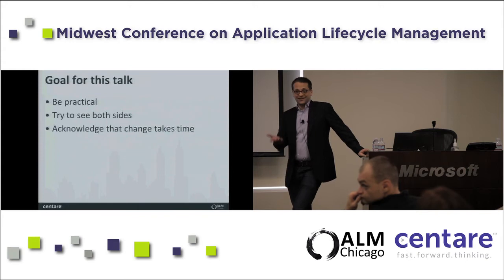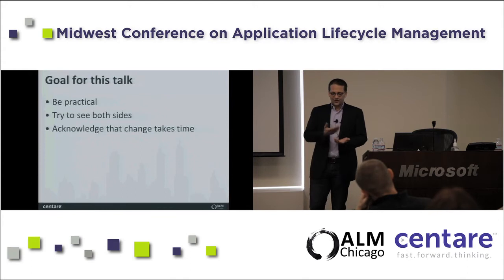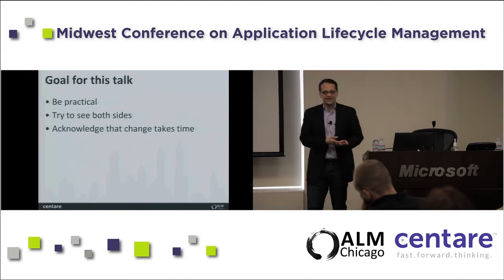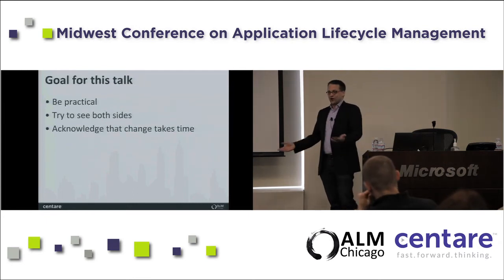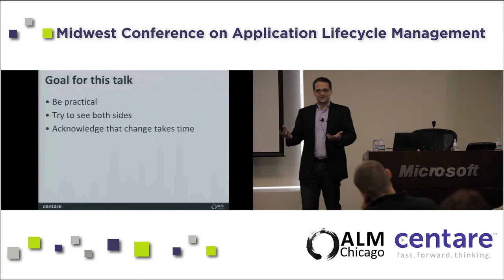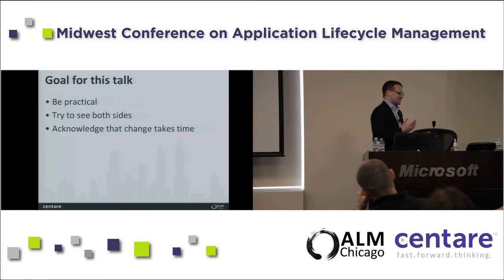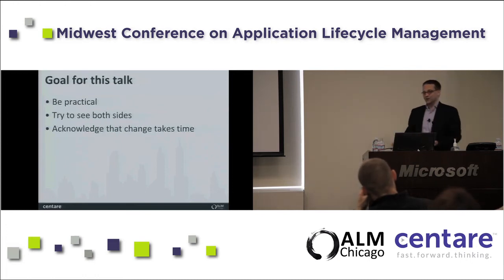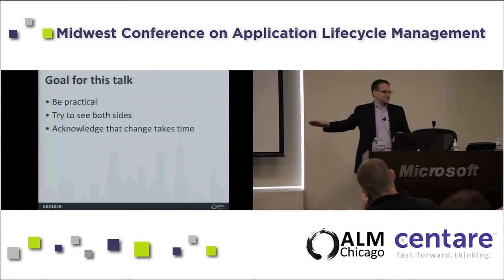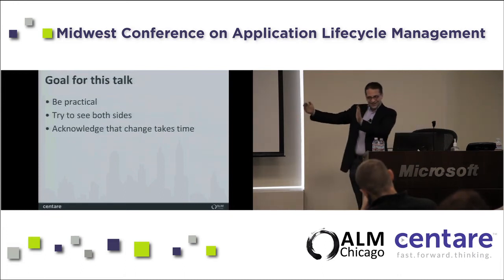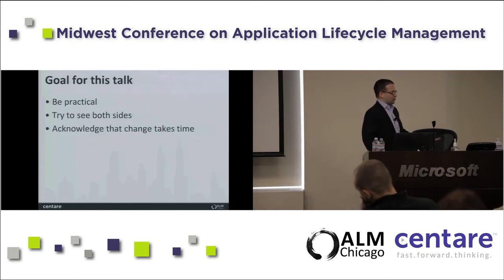Yeah. Well, that's a really great one, because Scrum and Agile tend to emphasize test-driven development and unit testing. It's definitely good. And in waterfall organizations, a lot of times that looks to them like extra stuff that they can cut out of the schedule and ship earlier. And yeah, you're laughing because you know that it doesn't really work out that way. You end up with the same number of problems and bugs, you just find out about it at the end of your life cycle, in that big fat testing phase at the end of your project that now suddenly gets bigger and bigger because you're finding more and more bugs.